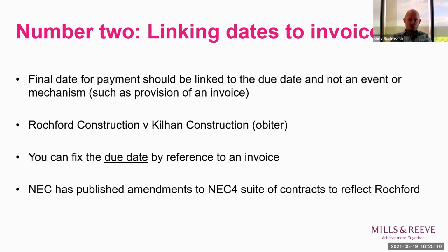And whilst the judge's comments on the point didn't form part of the binding part of the decision, so it's what we lawyers like to call obiter, in my view, the decision is almost certainly correct, and I think very likely to be followed if it actually comes up to be decided as a point in and of itself. Now, the way to include provision of an invoice within the payment process is to link it to the due date rather than to the final date for payment.